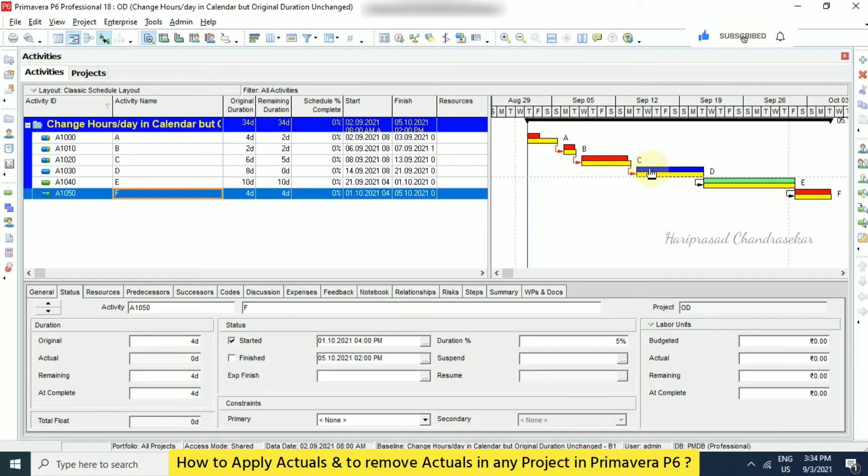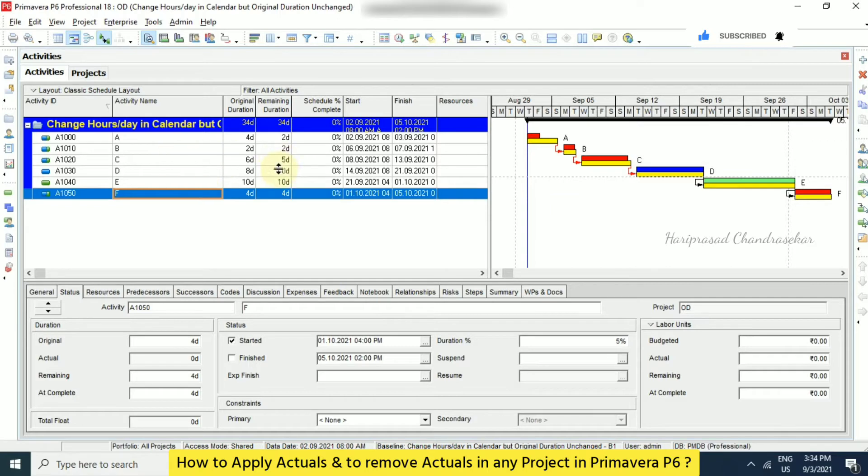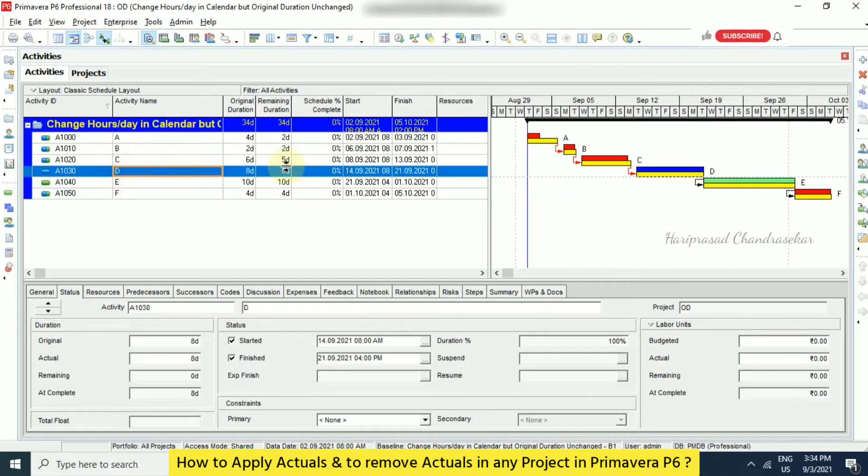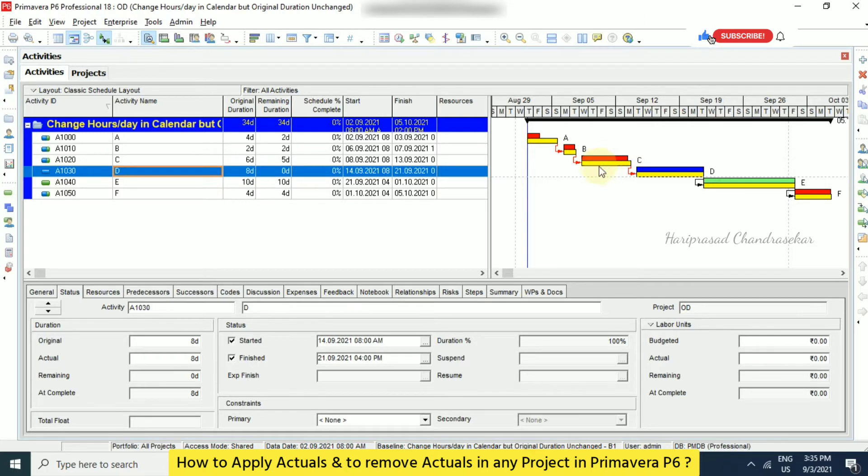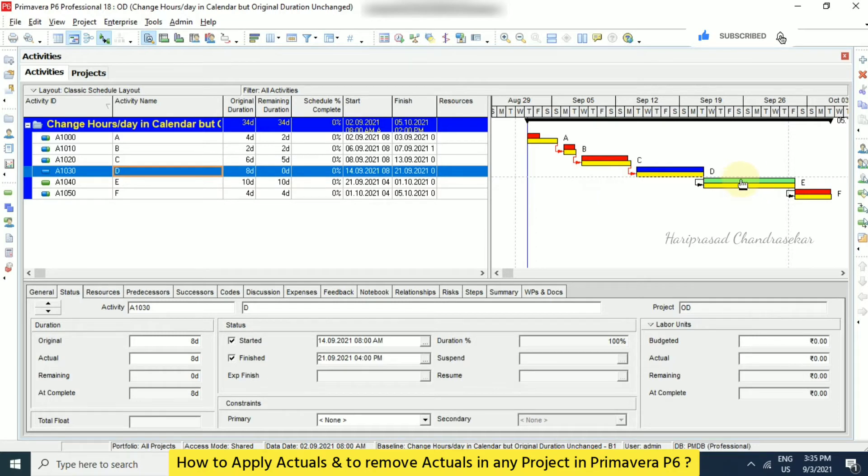The color blue indicates this blue color in the Gantt chart indicates that this activity completed, which means 100 percentage. So rest of the things are still in progress, but we can see it has started. And we can also see here it is in green color, which means it is not started.